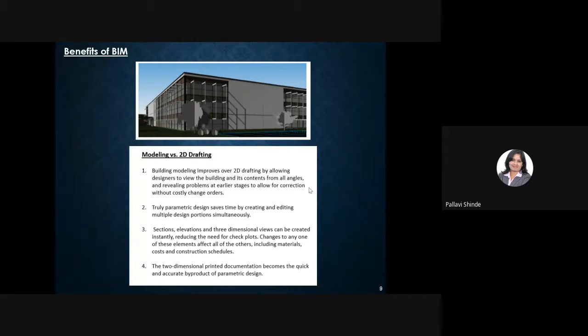What do you mean by parametric? Parametric means it defines a size, shape, volume of that particular object, which can be extracted as a bill of quantity. So we are not only modeling the models, but we can also extract the bill of quantity of that particular model very properly with the volumes, and also we can add a cost factor to it, which can give us all the cost of the modeled objects.